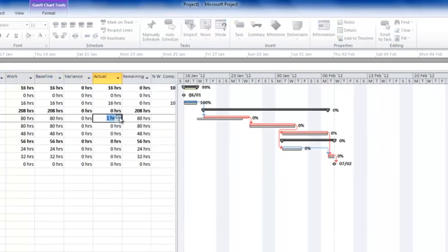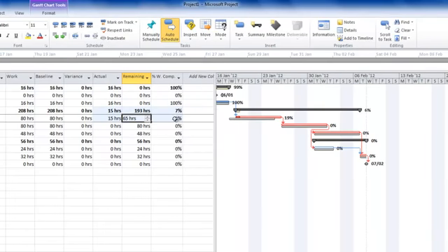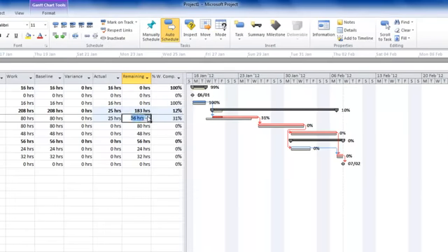We could actually show that we've put in, let's say, 15 hours work. This will automatically show you you're 19% complete. You see, Microsoft Project will do the calculation for you. Let's suppose that we've found we've got some problems coming up ahead, and the project manager has quite rightly shown that it's now going to take longer than we originally planned.